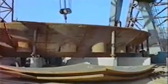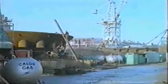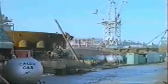You can see the bottom ring segment being fabricated here. As it will support the weight of the upper rings and also transmit the internal weight of a graphite core to the reactor foundation, the plate is 4 inches thick. Our construction schedule called for number 1 reactor to be completed some few months before number 2. So we pressed on with number 1 vessel first.